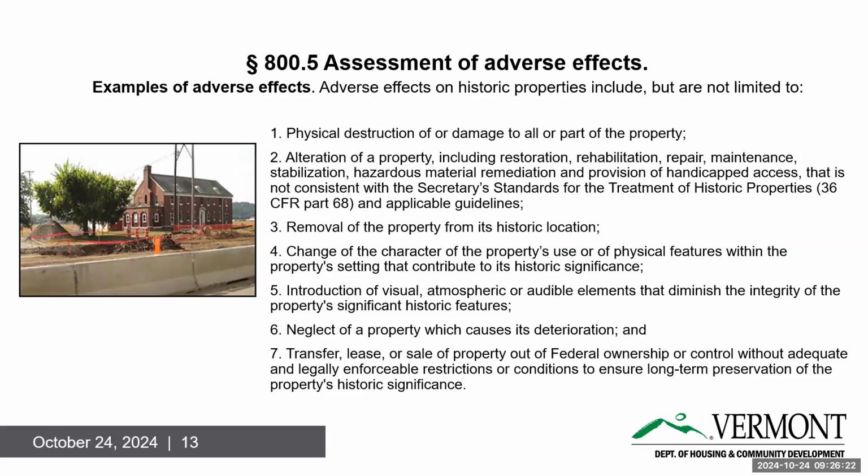Number 2 is really the most where we get the adverse effects. Removing a property from its historic location. So particularly if there's a historic district that a resource is in, moving it outside of that historic district is an adverse effect, but it also creates another level of review.